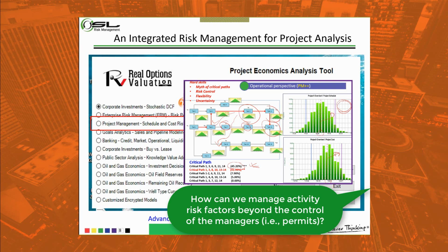Of course, there are other risks that are really difficult to attach from the project management perspective, specifically health, safety, and environmental risk. The organization needs to decide how they are going to mitigate, transfer or reduce that risk as well. But if you detect something impacting a certain activity, start questioning that number, because most likely the detailed plan number is not going to hold. You need to start introducing tolerance. If the uncertainty disappears, you are not able to update the plan. So what you are going to do is use that uncertainty in the network, and you have more control always.